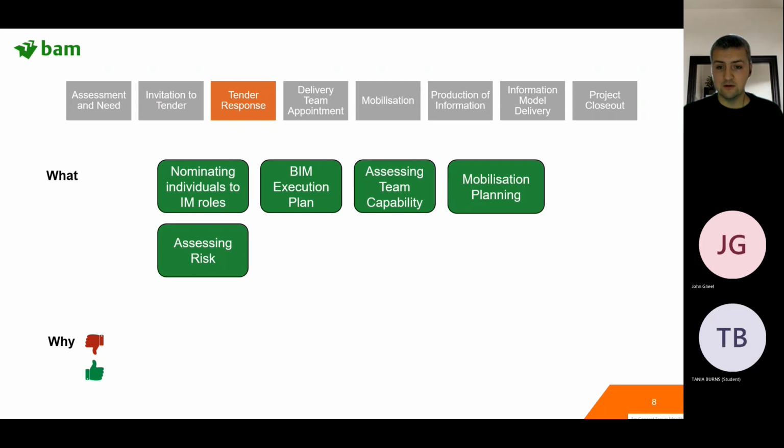Whatever it was, it was two things that couldn't go together because the subcontractors with that advanced capability just didn't exist in that locality at the time. So the standards force us to really go through this process of de-risking, making sure that everything works, and carrying out an assessment of the capability of your project team is a really important part of that.